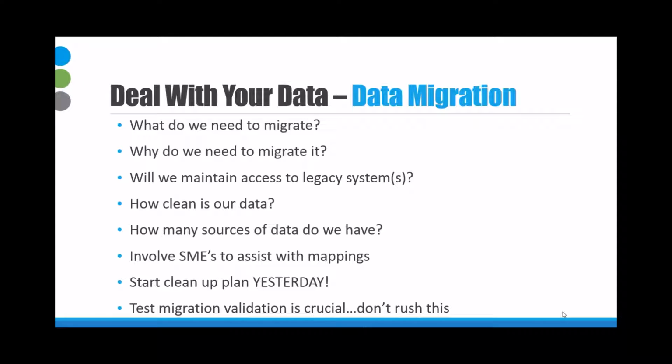All right, and then the next step here is step number 6, deal with your data. So this involves data migration and data integration. We'll start by talking about data migration. A lot of times people just assume that we're launching a new system, we've got to migrate all our data from the old system. But really you want to stop and plan this out. Data migration and integration can be a very time-consuming and very costly portion of the project if not planned out correctly.